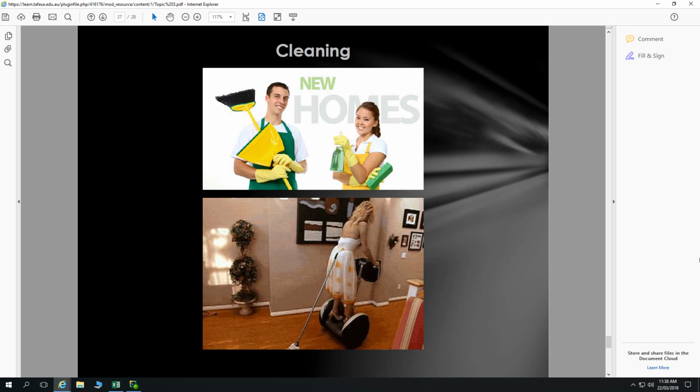It's not in the slides, but I'll quickly make mention of it as well. Throughout your building process, typically your contract is going to include what are called progress payments, so the builder doesn't have to outlay all of the money. So let's say it's a $300,000 build. If the builder has to outlay that $300,000 and then get paid right at the end when all of the identified defects are remedied, that's a very long time for that builder to have all of that money outlaid. And if they're working on several projects, that's going to be an incredibly expensive procedure, and the vast majority of builders will not be able to finance that.